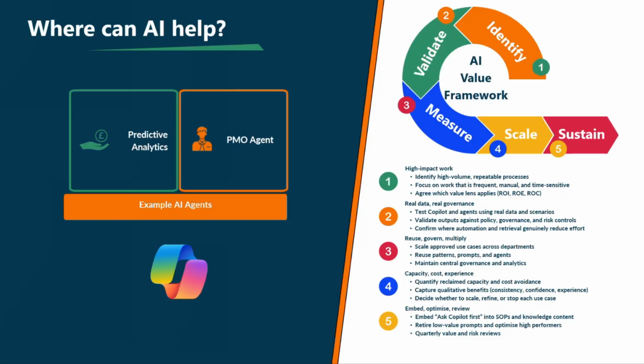Predictive analytics goes that little bit step further. Instead of telling us which projects are red today, it identifies the projects that are likely to be red based on some trends that it can see. So based on previous projects, when they've had these 5 risks come about, or when they've seen these delays in these particular parts of the project, they've all ended up X days late. Therefore, we're starting to see that pattern on this set of projects. So you might want to have a look at these. We think these are likely to become red in the future.